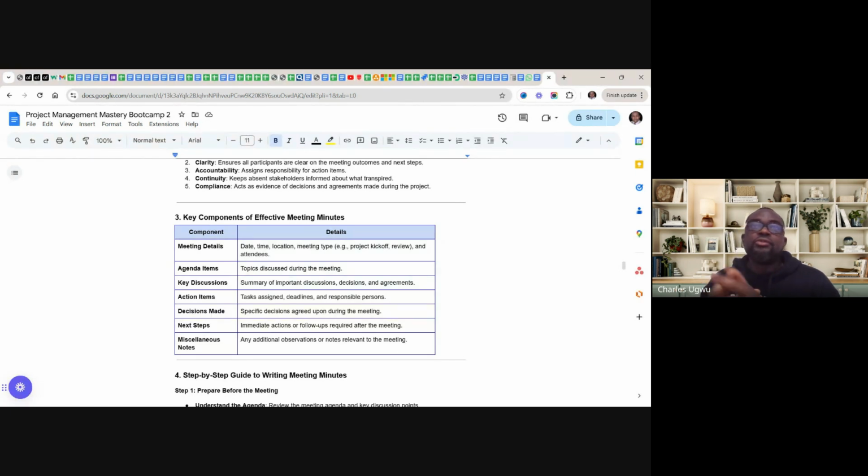How many of us have an agenda of what we need to talk about? I've seen so many of us, we just start a meeting, but no agenda. Key discussions: summary of important discussions, decisions and agreements, action items, tasks assigned, deadline, and responsible person.